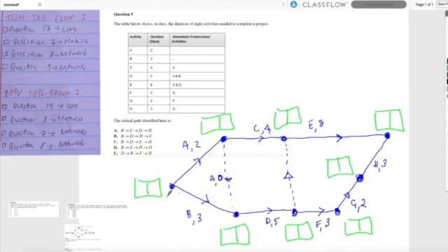Here I go. Pick another color, brown. So scanning, forward scan, 0, 2. Now I'm thinking that goes down there, so think about it. 2 there, but 3 this way. Biggest on the way out, of course. 3 and 5 is 8. Now this way, 2 and 4 is 6. But I've got to put an 8 there because it's biggest on the way out. 8 and 3 is 11. 11 and 2 is 13. 13 and 3 is 16 that way. 8 and 8 is 16 that way.